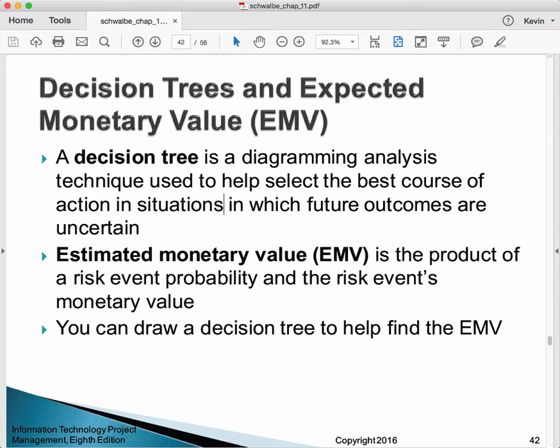We just didn't know how to quantify the risks involved. And it turned out that expected monetary value, this decision tree approach, was very promising for us. And so we went from a world where we were saying, well, gee whiz, I wonder how risky this is, and I wonder what kind of decision we should make to go ahead and bid on this project or not. We went from just kind of thinking about it and gee whizzing it to actually having some calculations to do that I found reassuring. Okay?